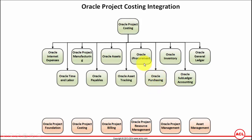Oracle Purchasing deals with contractor payments, as just explained, and iProcurement and purchasing work very closely together. You can also raise requisitions for miscellaneous items or catalog items that you would like to purchase as part of project execution, and those requisitions are used to create purchase orders. You can also create standalone purchase orders not related to requisitions for miscellaneous or asset purchases related to projects, and the costs of those purchases will be reflected in project costing.